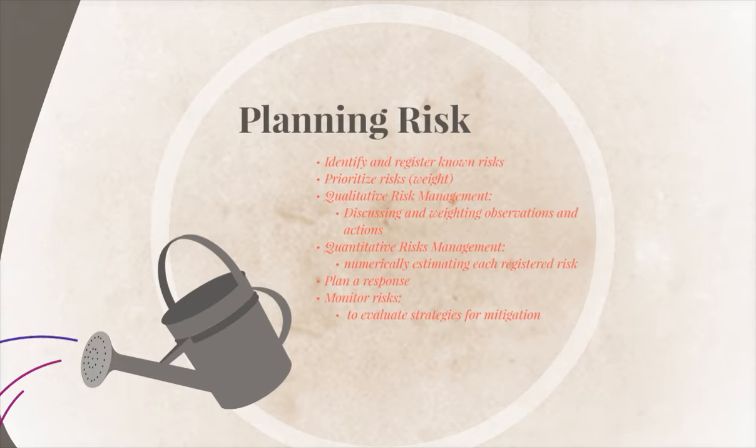Maybe we'll say it's a 20% risk and put a numeric value and move it into a quantitative style of doing this, or low, medium, high. Versus if you have a lot of old equipment that's prone to problems and errors happening all the time, or knowing that you need software upgraded, you may want to reassess this, as it's a higher risk that needs to be looked at before you take on a project.